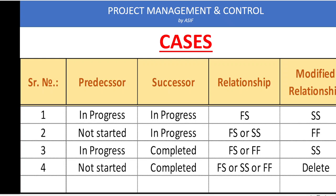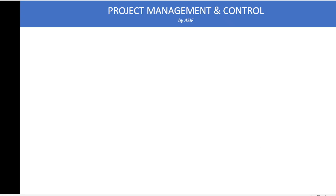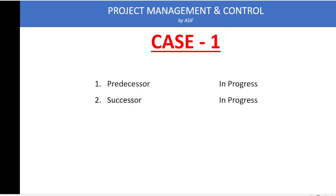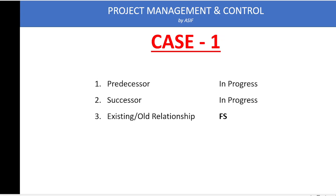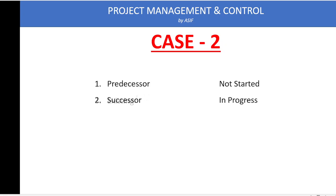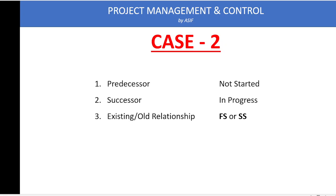To remove out-of-sequence activities we have to encounter four cases. The first case is that predecessor and successor are both in progress and linked with Finish-to-Start. In this case the Finish-to-Start relationship needs to be modified to Start-to-Start. The second case is that the predecessor has not started and its successor is in progress, linked with Finish-to-Start or Start-to-Start — in this case it is modified to Finish-to-Finish.